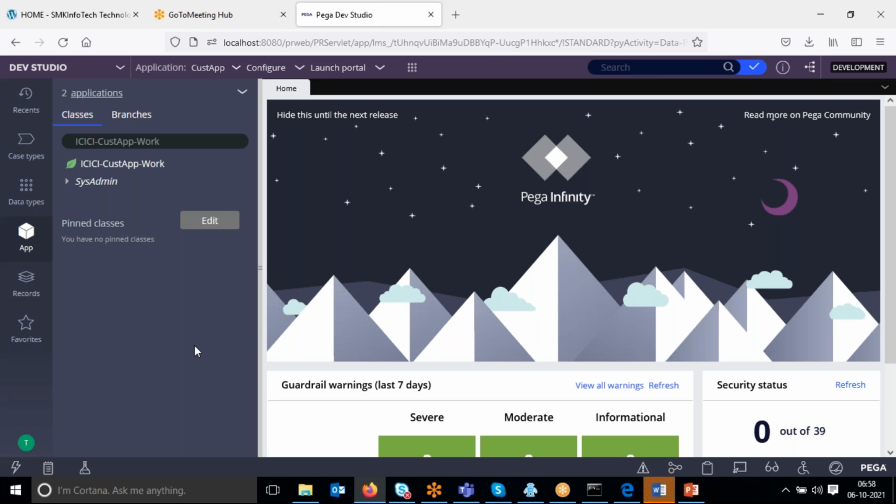Understand the scenarios, right? Some resource may suddenly be unavailable due to different scenarios, different problems. In that time, I won't be able to handle that kind of situation. If you have some buffer time, then you will be in safe mode. Otherwise, if you give exactly 10 days, that is a very big risk for you. So the LSA people take care of everything.